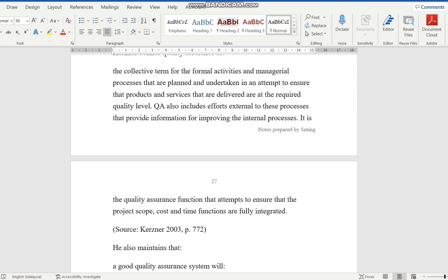Then when these things are being delivered, uploaded onto vehicles or transportation, delivered to the site or to another production line or another section of the lines, we will have another checkpoint to see whether maybe a certain thickness is correct. It's up to you to set up this checkpoint, hold point. Or you can have some visual checking or some measurement checking before you place it into the next production line, or before the next process on the construction site, for example. So we set this hold point, we set this checkpoint.